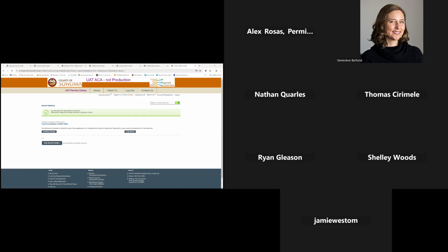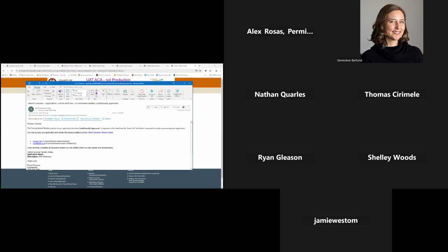What I've done on my end is I've completed two separate reviews, one under the engineering review, which is the primary review for the sewer construction permit, and a secondary review, the encroachment review. The encroachment review really kicks in when there's any work proposed in the right-of-way. I will acknowledge, as we see, the plans themselves actually identify a private road, but for the purposes of our training, I wanted to introduce the concept of an encroachment review or an encroachment permit, because very often sewer construction work happens both in the right-of-way and on private property.